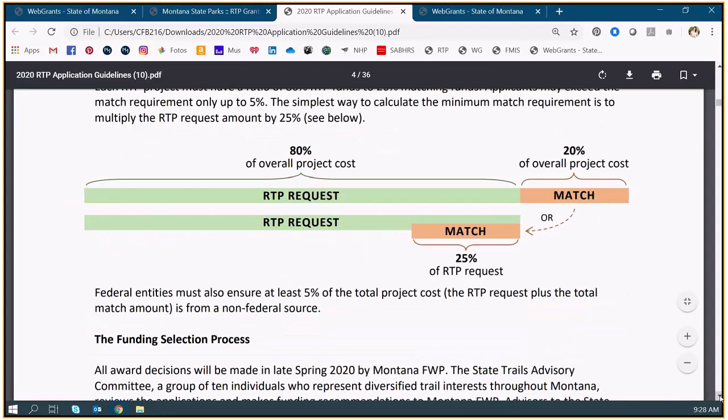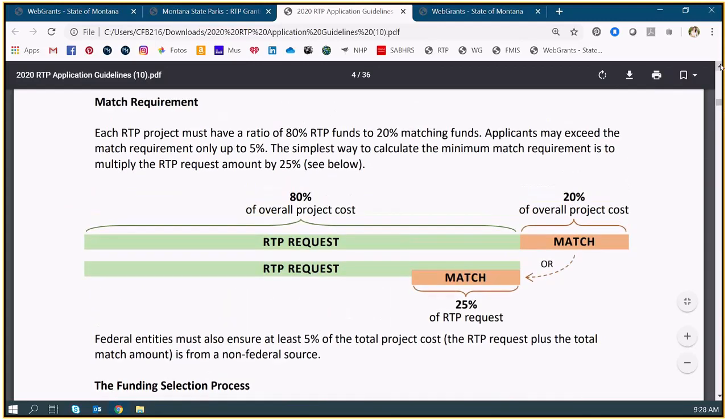Everybody knows, I think, hopefully, who's in this room, just because you were active enough to read that information I've sent out already. So everybody knows, I hope, this is a reimbursement program, right? So you expend your project funds, then we can reimburse you. So I cannot reimburse you until I see that your entity has expended funds and there's even a canceled check or an account statement, something showing that that transaction has taken place.